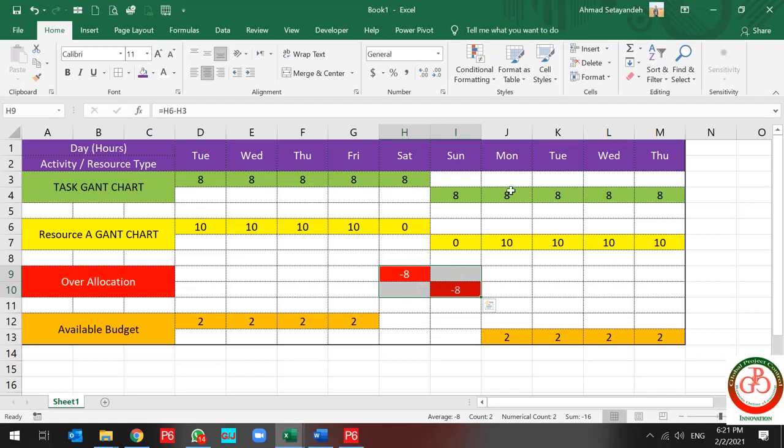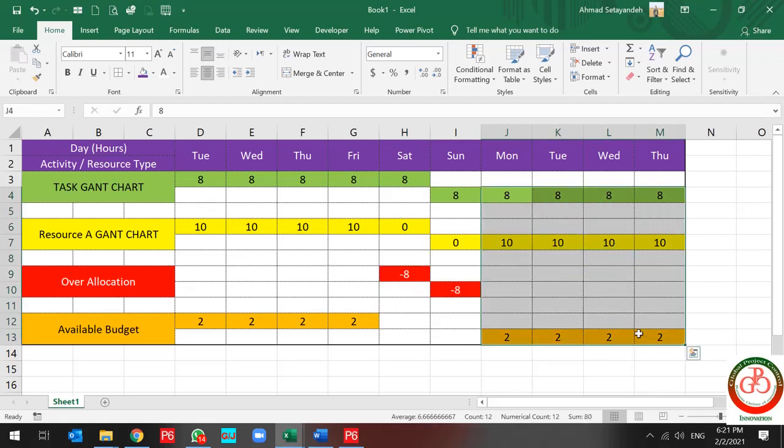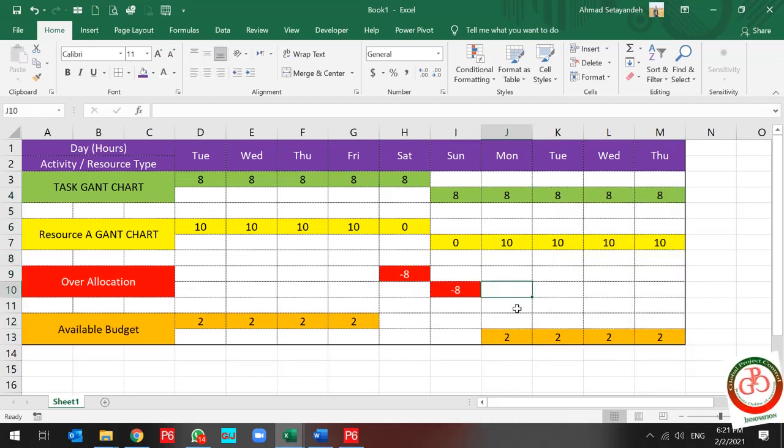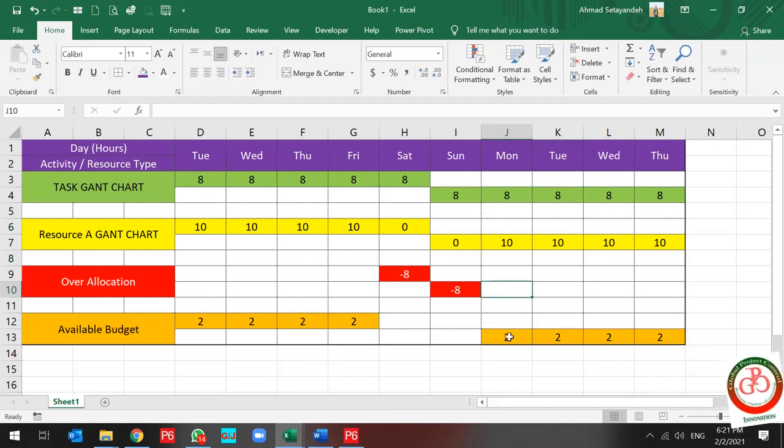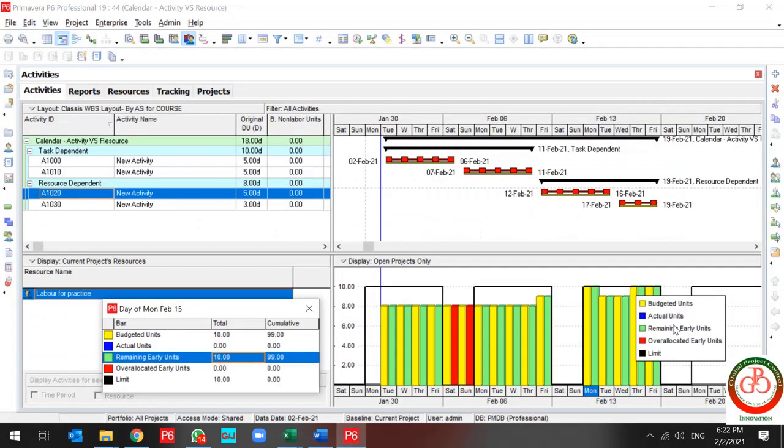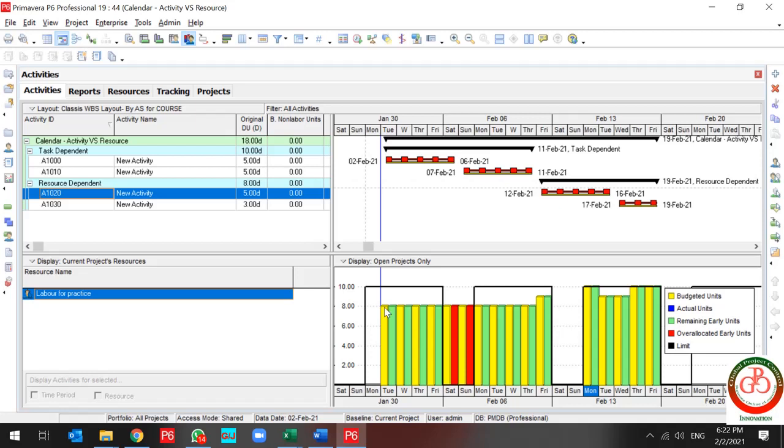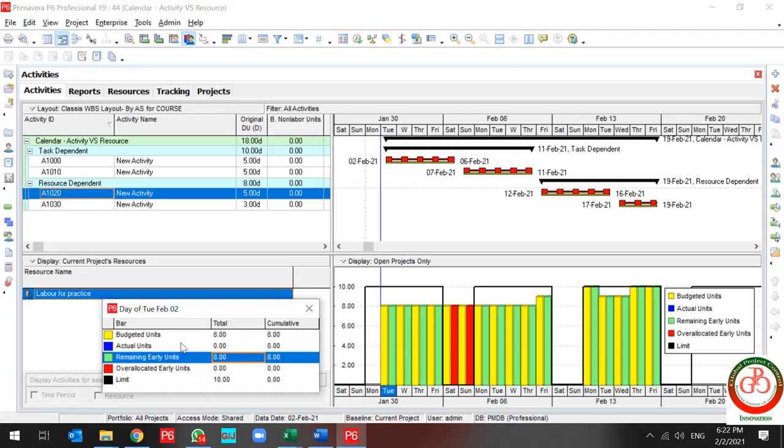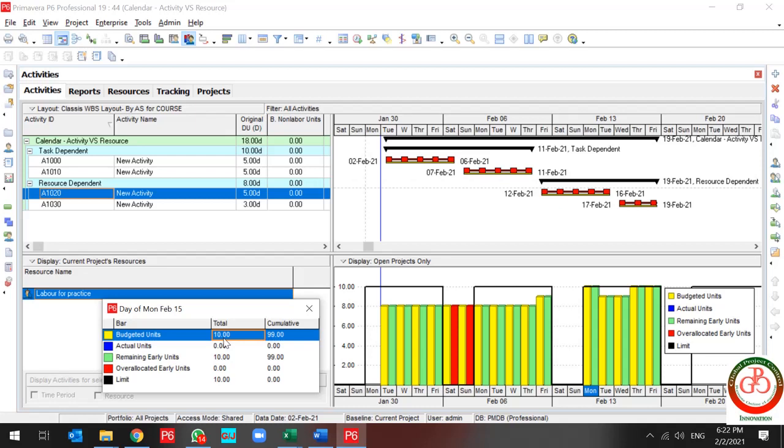And for the remaining days we don't have any over allocation. Also we can increase our working hours from eight to ten and our resource can work. So this is why we have only eight hours per day on this task, but on this task we have ten hours per day work. Because the second activity is resource dependent, but the first activity is task dependent.